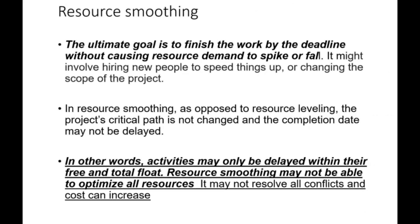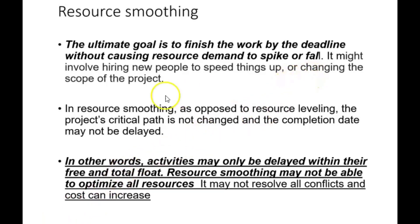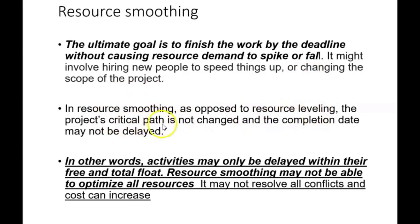The last thing we're going to be looking at is resource smoothing. The ultimate goal is to finish the work by the deadline without causing resource demand to spike or fall. It might involve hiring new people to speed things up or changing the scope of the project. In resource smoothing, as opposed to resource leveling, the project's critical path is not changed and the completion date may not be delayed.